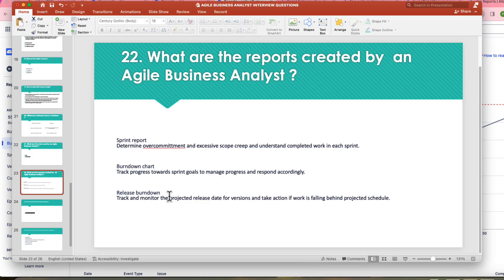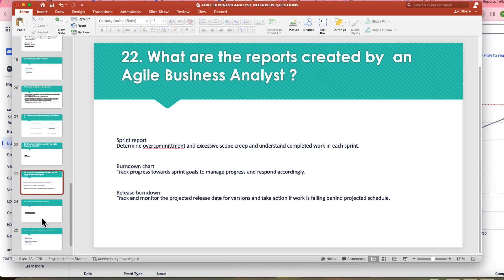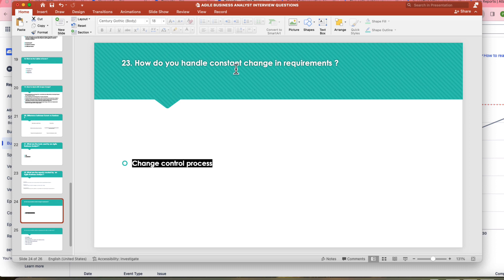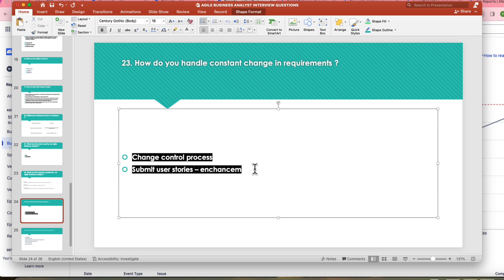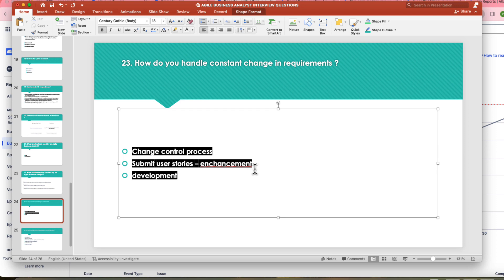The last question is: how do you handle constant change in requirements? As with scope creep, use the change control process — ask business owners to submit user stories for new requirements. Review those new user stories with your development team, scrum master, product owner, and manager before deciding whether and when to accommodate the changes.